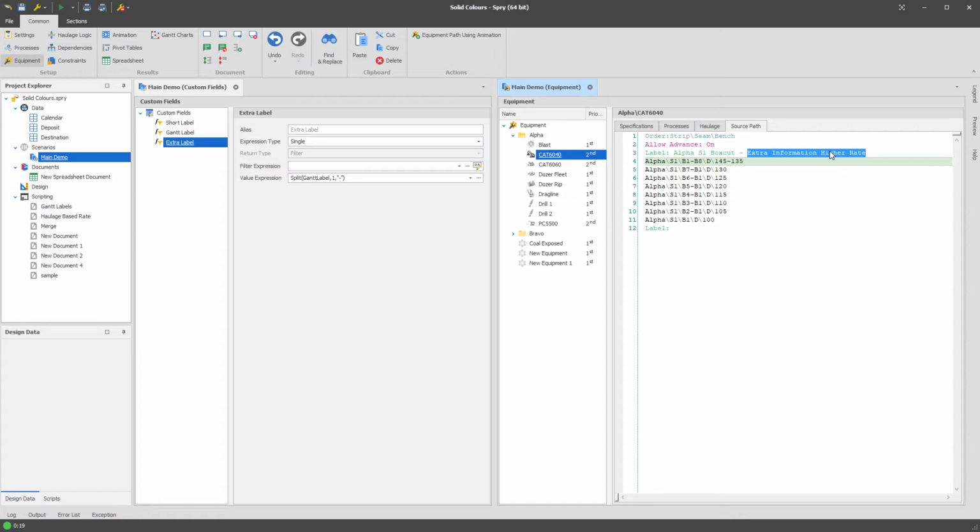So you might put in something like R and then a colon, and you might type R high. You need something that tells it that R, which I'm using for rate, you might go R high. What other information might be useful here? Might go Z for zone, and then you might put in the zone that you're in. I'm just going to make up a particular zone, and then I'm going to put a full stop at the end. You can pick any character you like, but you're looking for something unique that starts it, and something that ends it, which doesn't have to be unique.